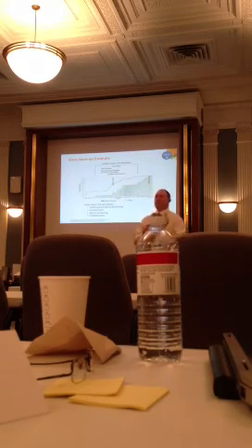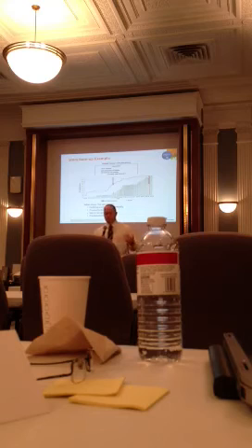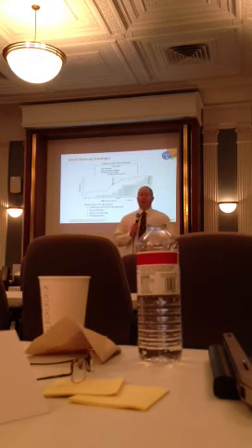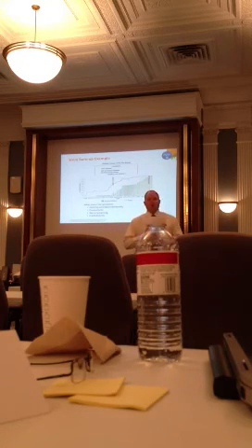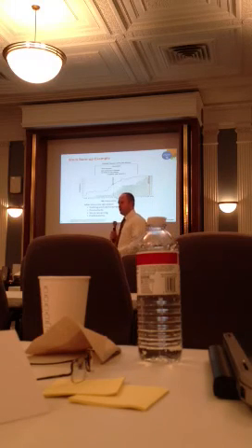Agile has this concept of an iteration 0 or sprint 0. Now, I'm not in love with the name because it's a little bit of a misnomer, in the fact that I don't care how long your iteration 0 is. It can be as long as you need. The bottom line is that in your iteration 0, you're doing all the work you need to do so that when you get to iteration 1, you can actually start delivering something.